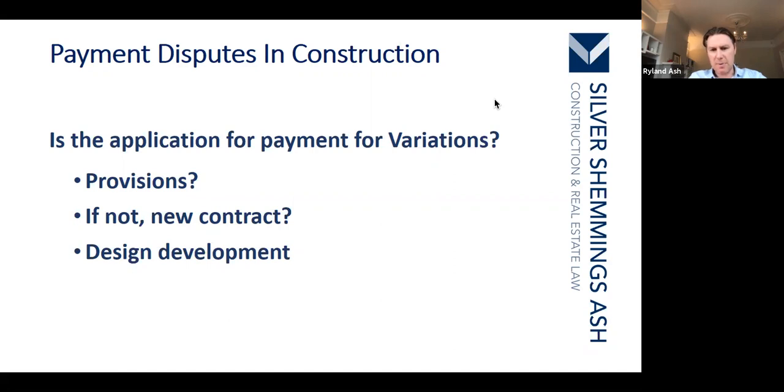What effectively happens is if you make separate agreements in relation to what you're calling variations, in other words, changes to the works, they can become new standalone agreements, new standalone contracts in their own right, which, if you're listening to what I'm saying, you'll recognize could lead to a great deal of difficulty between the parties, and obviously trying to resolve multiple contract disputes is a mess.